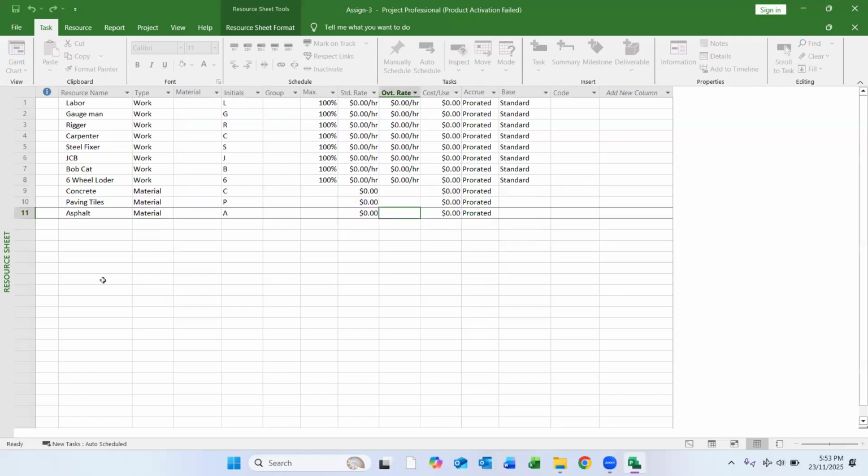And the last one is the cost resource type. Cost means the activity cost in the BOQ or in the contract, the budgeted cost. I will name it cost. Here the initial can be renamed, but it comes automatically from the first capital letter of the name of the resource.